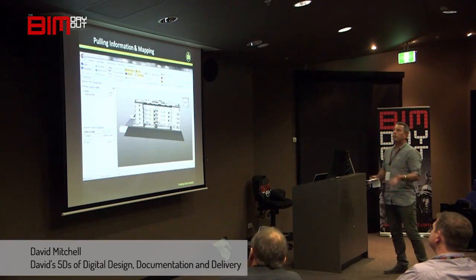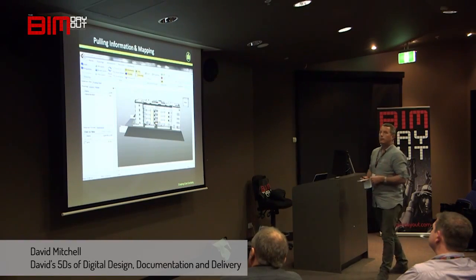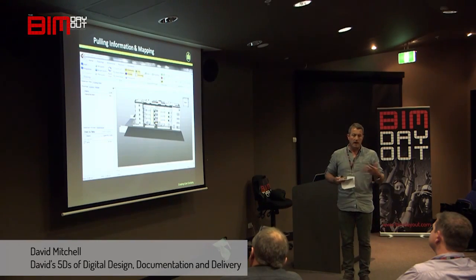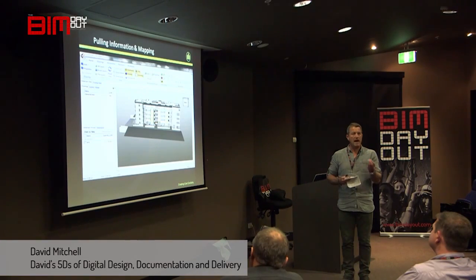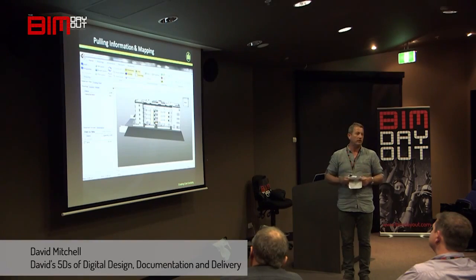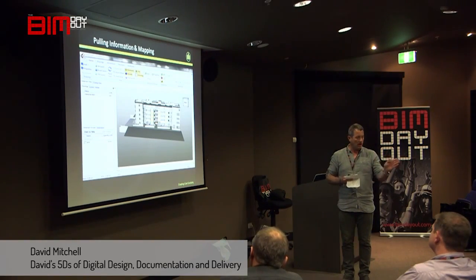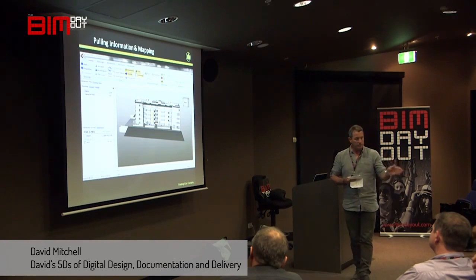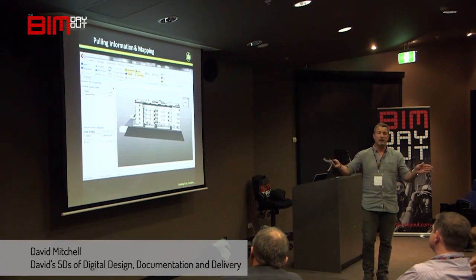The first one is being able to pull information from a model. We use a piece of software called Costex. But there's a more important thing to it and it's called a map. The map is the thing that tells everybody what a quantity is — it maps from the families and objects within the model to an estimate. And that map has a value to anybody.